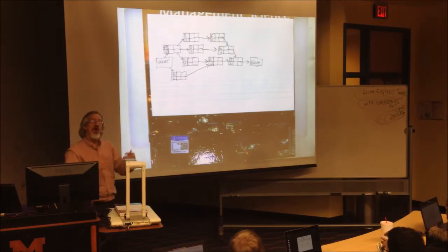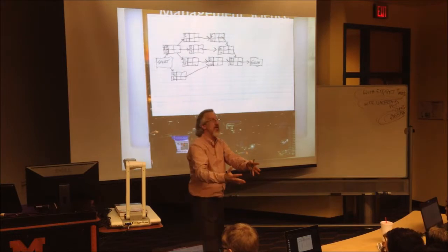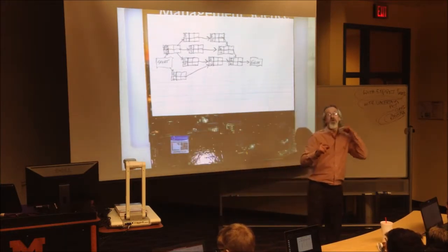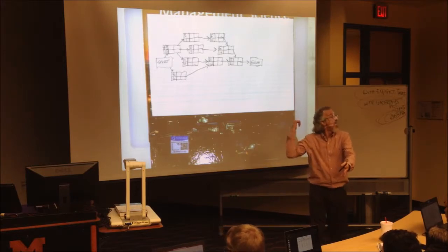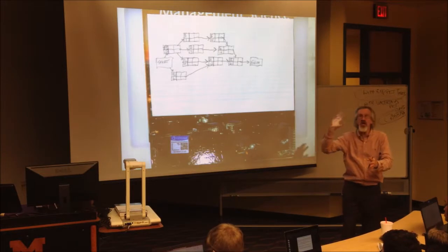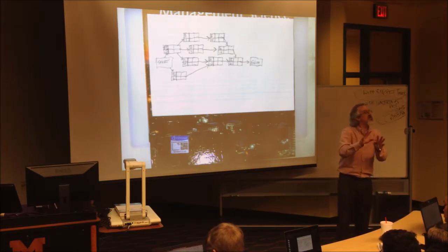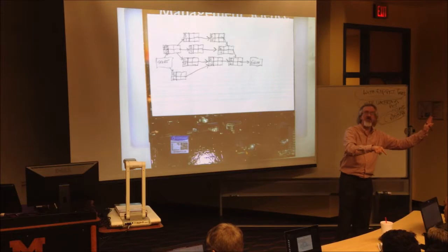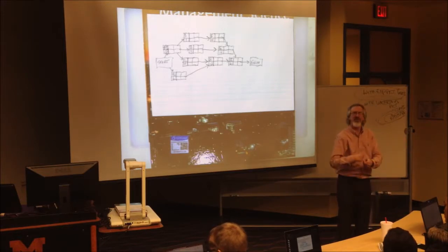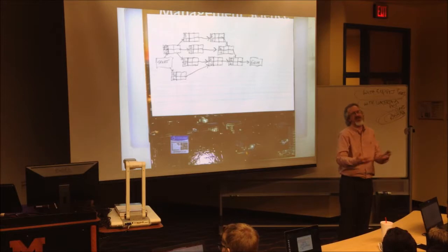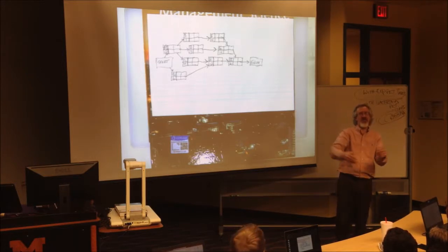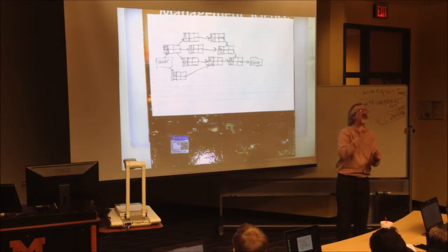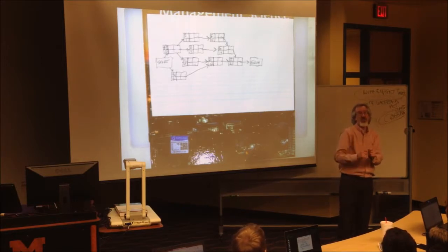The bank will say, we're going to lend you this $1 million, or rather, we're going to lend you part of this $1 million to get the project started. And to start with, because this project isn't generating any revenue yet, you only have to pay us back interest, none of the principal. It's like, oh my God, this is so cheap. I'm only paying back the interest. What rate are we at? 6%, 8%? All right, so far I've only been given $300,000 times 6% divided by 365 days or 12 months. Here's how much I get paid monthly, just the interest portion. So it's cheap, it's great.